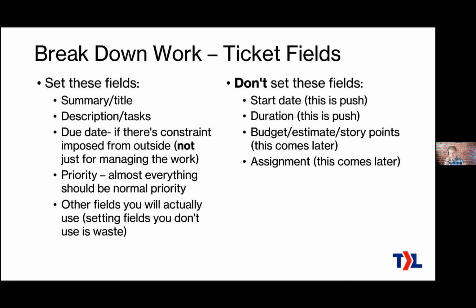The things that you don't set are the start date. Okay, that is pushing work to your engineers. So don't do that. Also duration, because that's related to the start date. Budget and estimate and story points. Don't do that in this step. We will do that in the next step, but don't do that just yet. And then don't assign it to anybody either, because that also comes later.